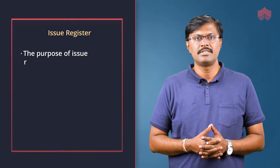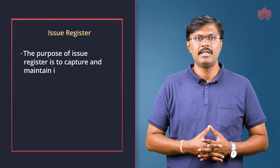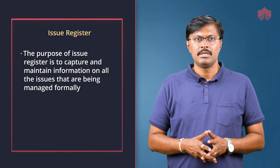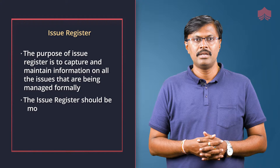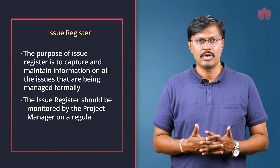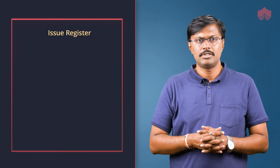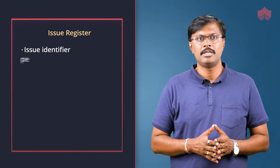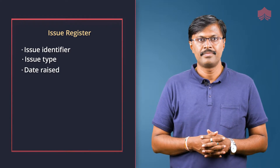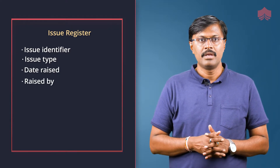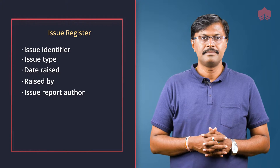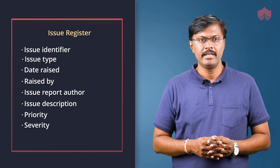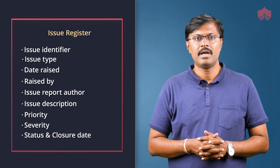The purpose of the issue register is to capture and maintain information on all the issues that are being managed formally. The issue register should be monitored by the project manager on a regular basis. It should capture: issue identifier, issue type, date raised, raised by, issue report author, issue description, priority, severity, status and closure date.